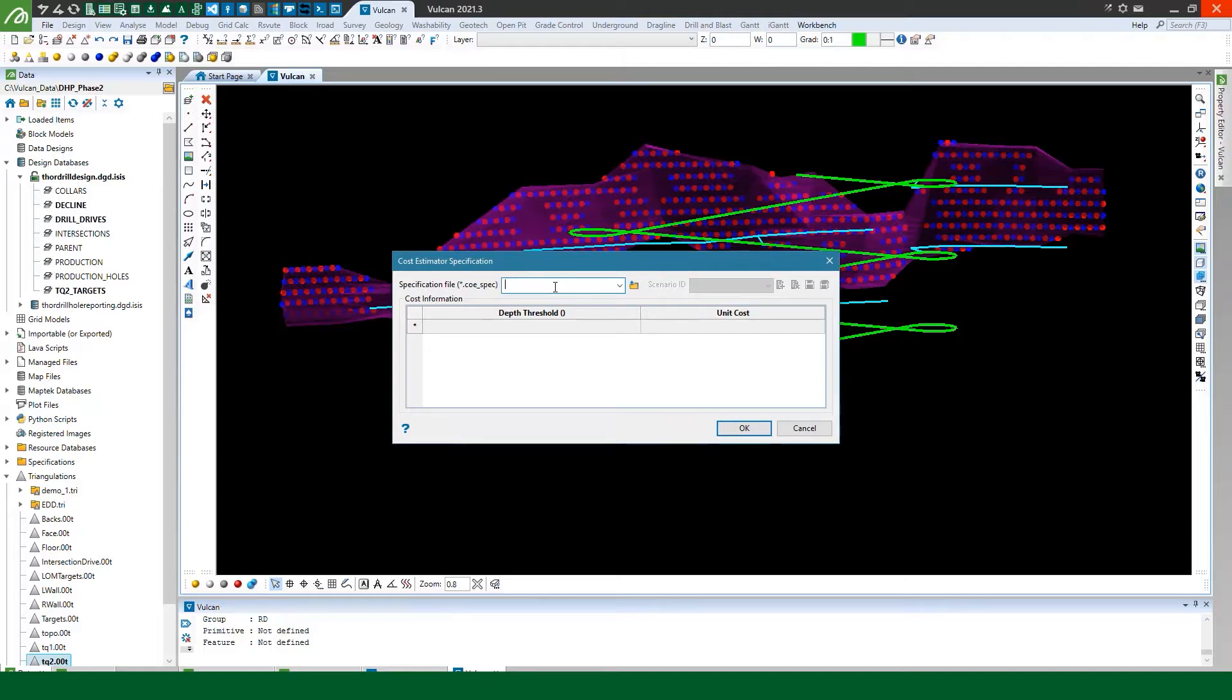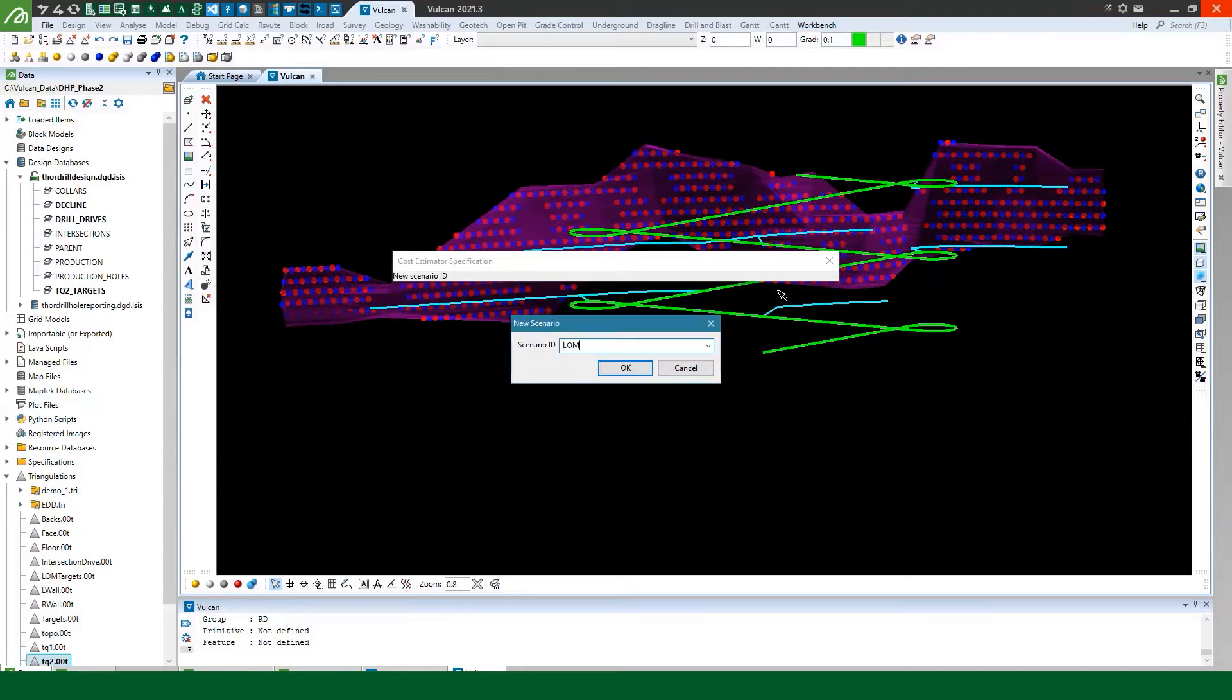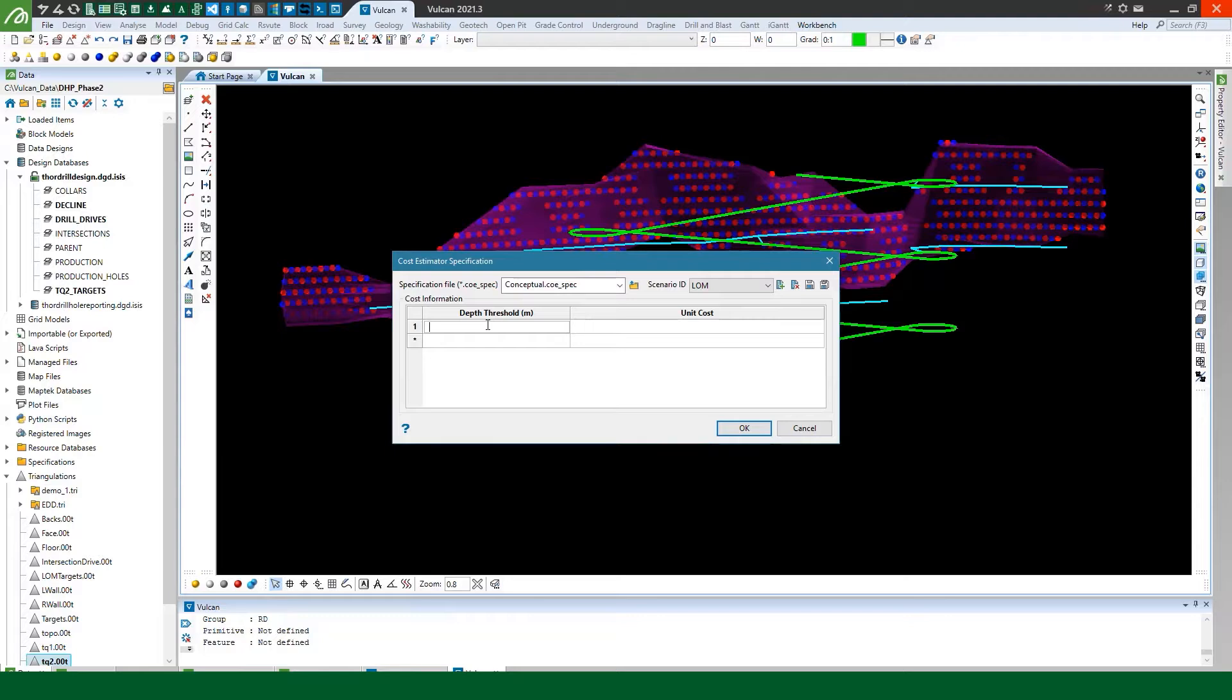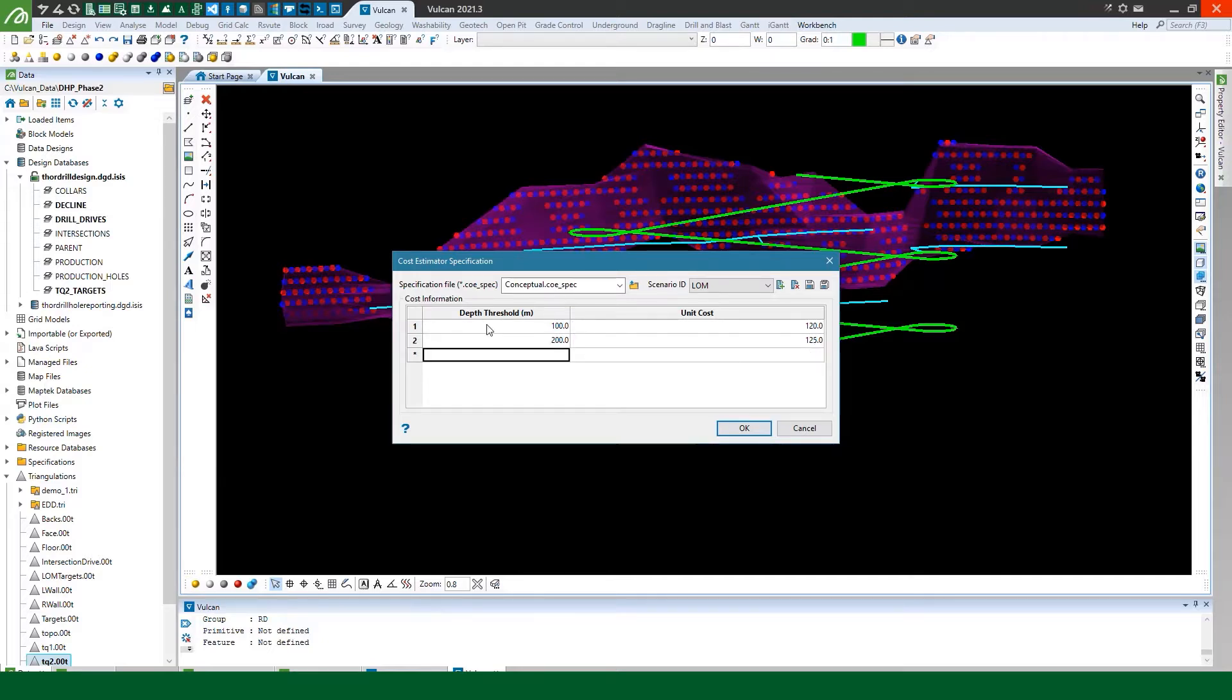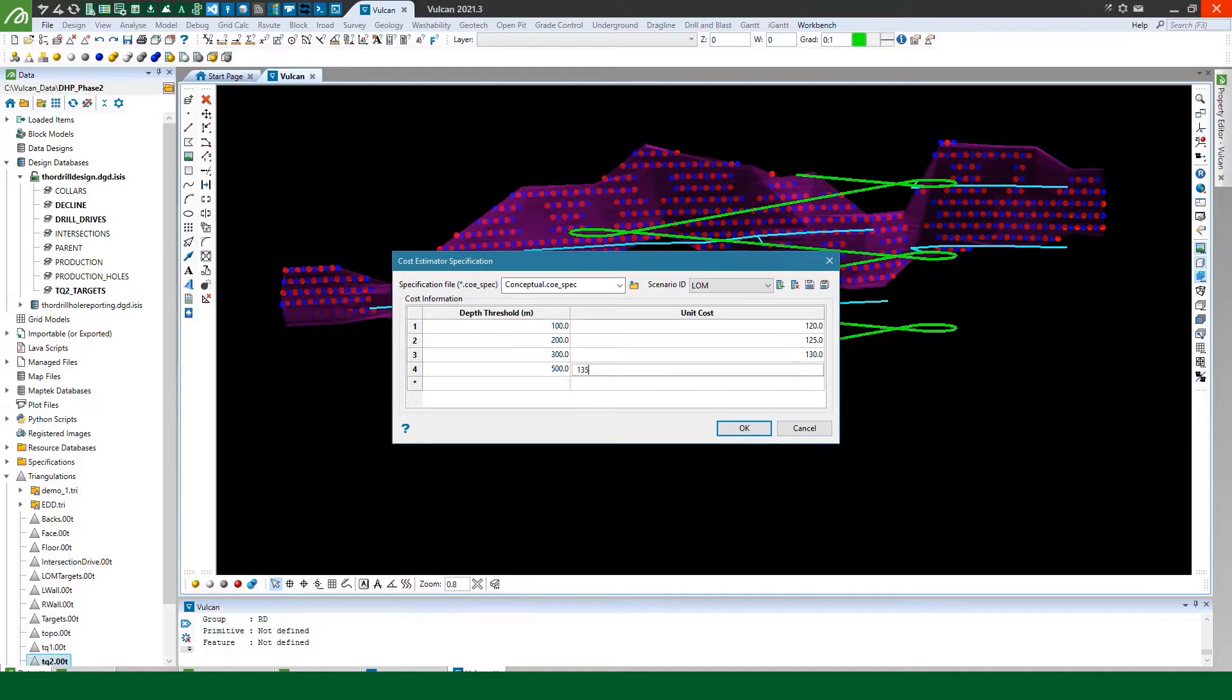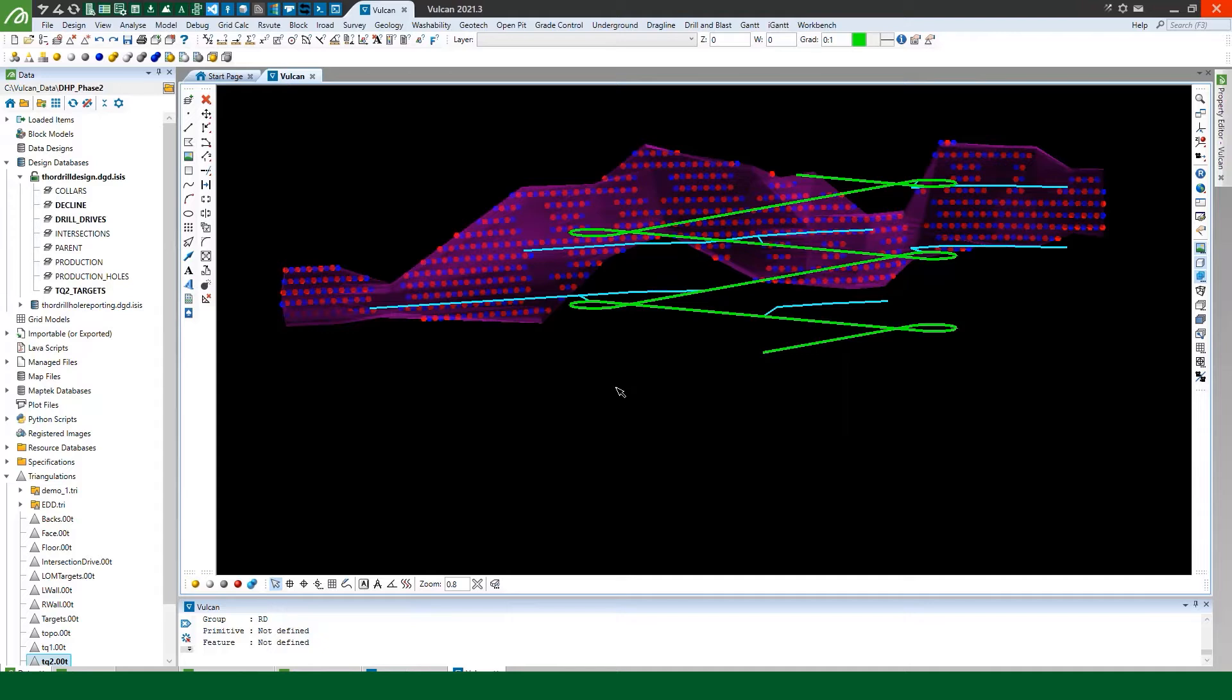Now this is pretty simple. I'm just going to make the numbers up here but let's say between zero and 100 meters it might cost me about $920 per meter and then from 100 to 200 might cost me 125, 200 to 300 might cost me 130, 300 to 500 might cost me 135 and then anything up to 1000 meters might cost me 140 and that's it. So we can save that.